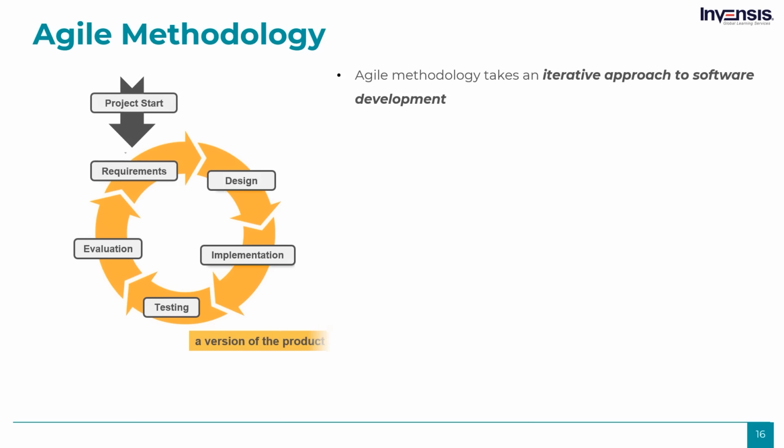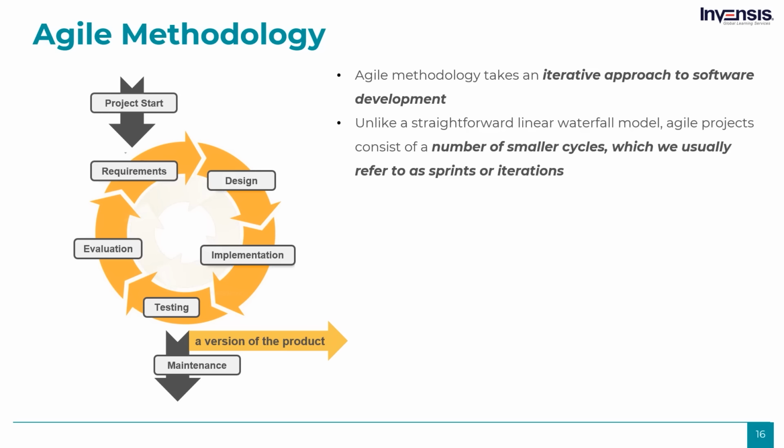Unlike the Waterfall model, Agile methodology emphasizes iterative development, or building software in pieces. By that I mean, you break down complex projects into small manageable goals. You are working towards these goals while adding new goals based on the requirements and customer feedback. They do this by breaking up the traditionally long delivery cycle into shorter periods, called sprints or iterations. The iterations provide the cadence for delivering a working product to customers, getting their feedback, and making changes accordingly.